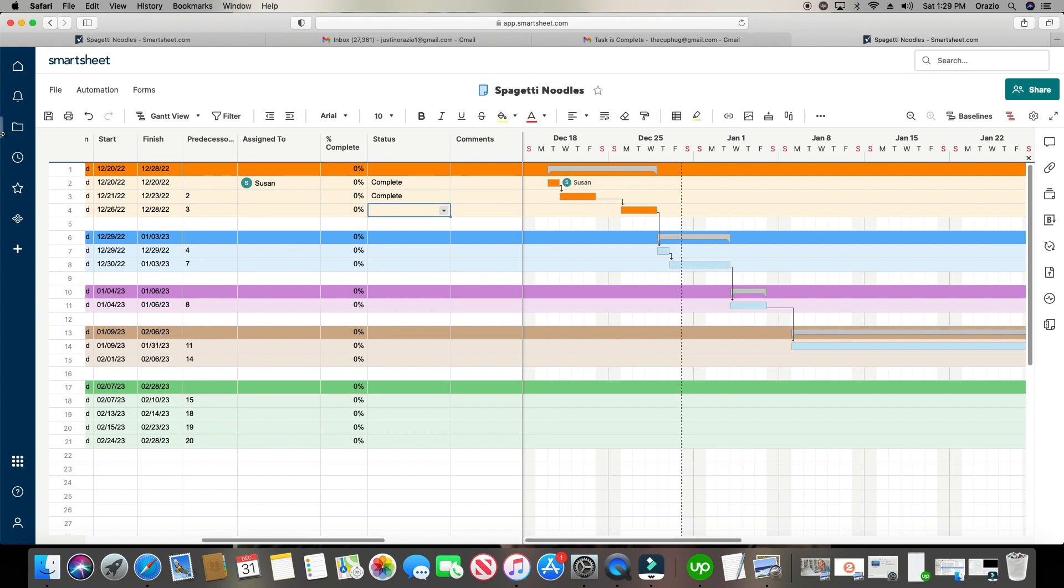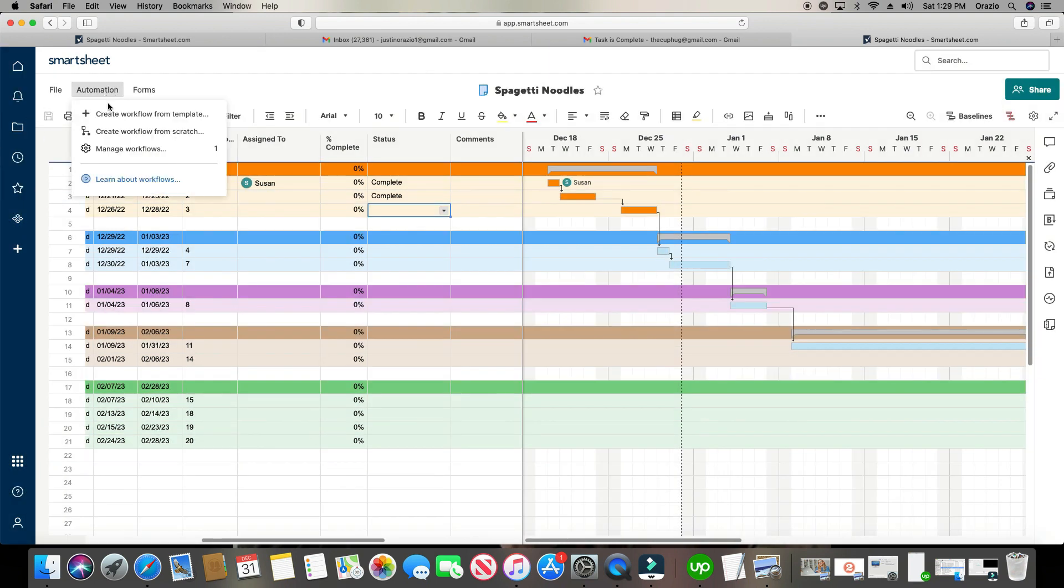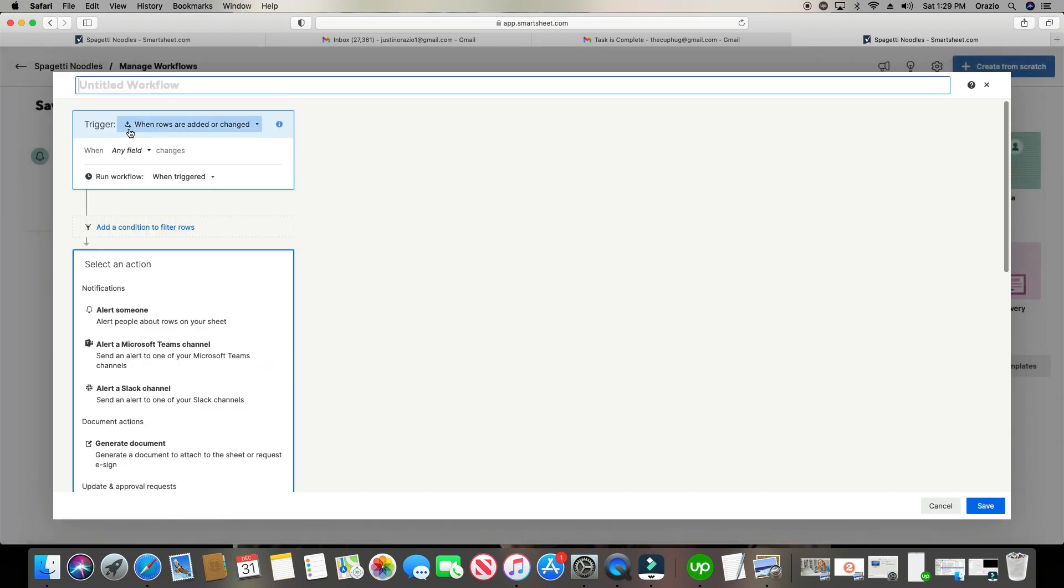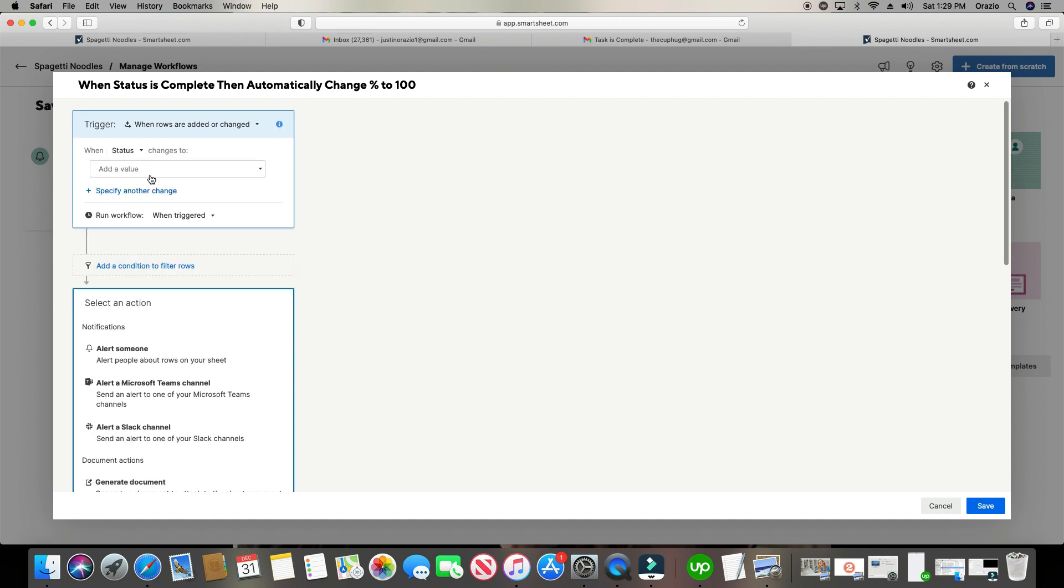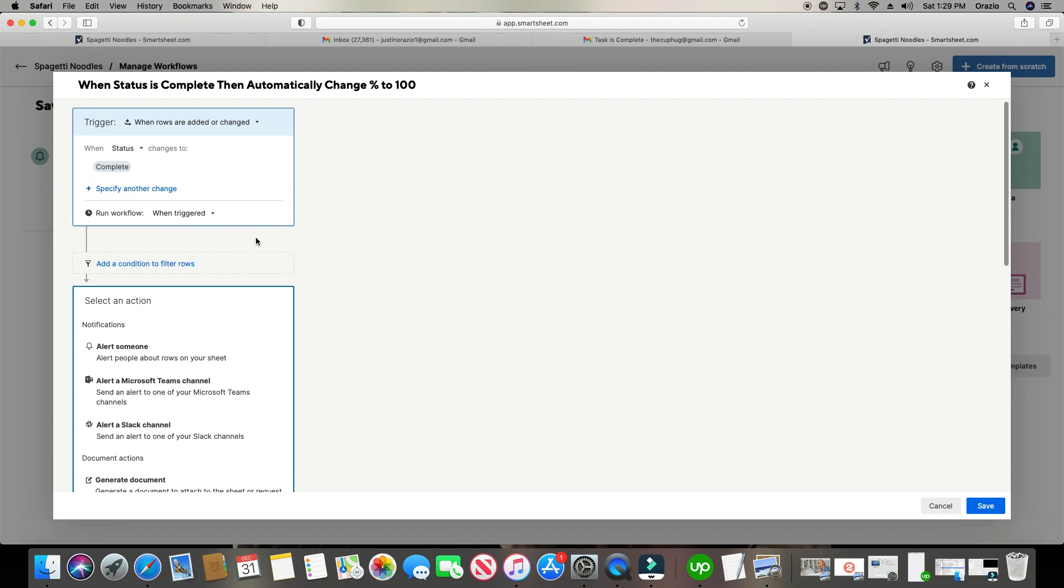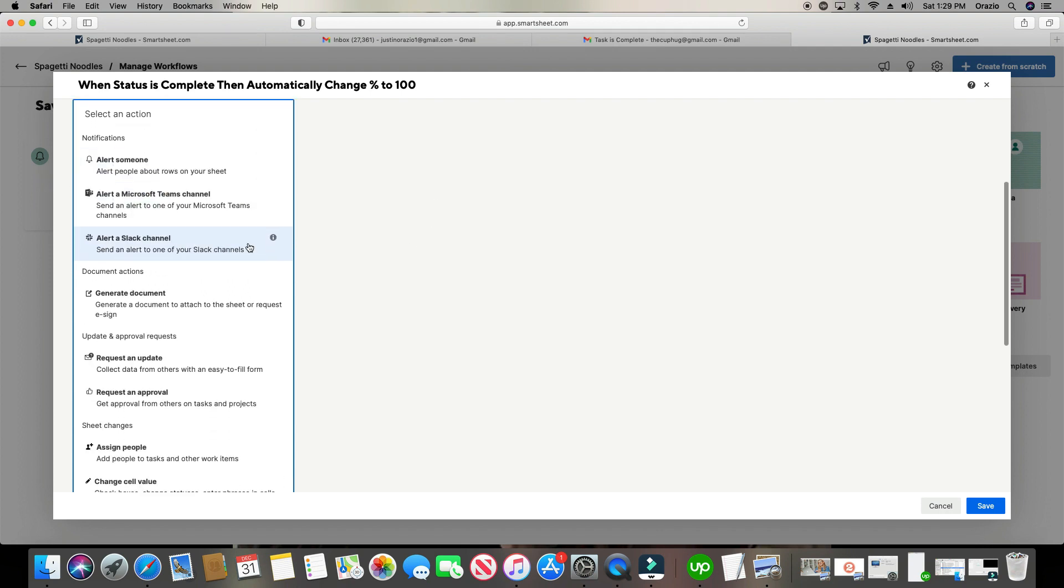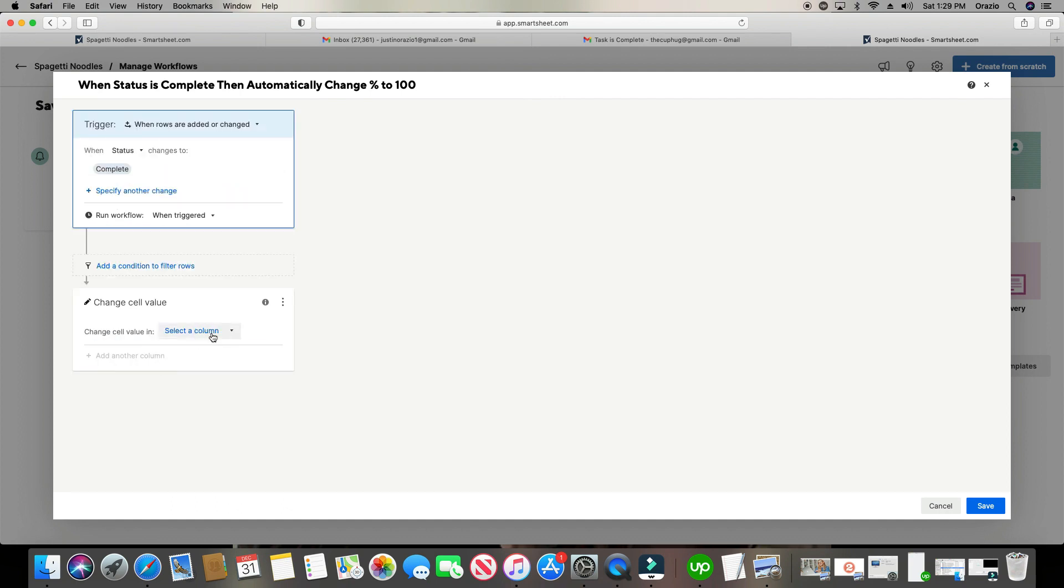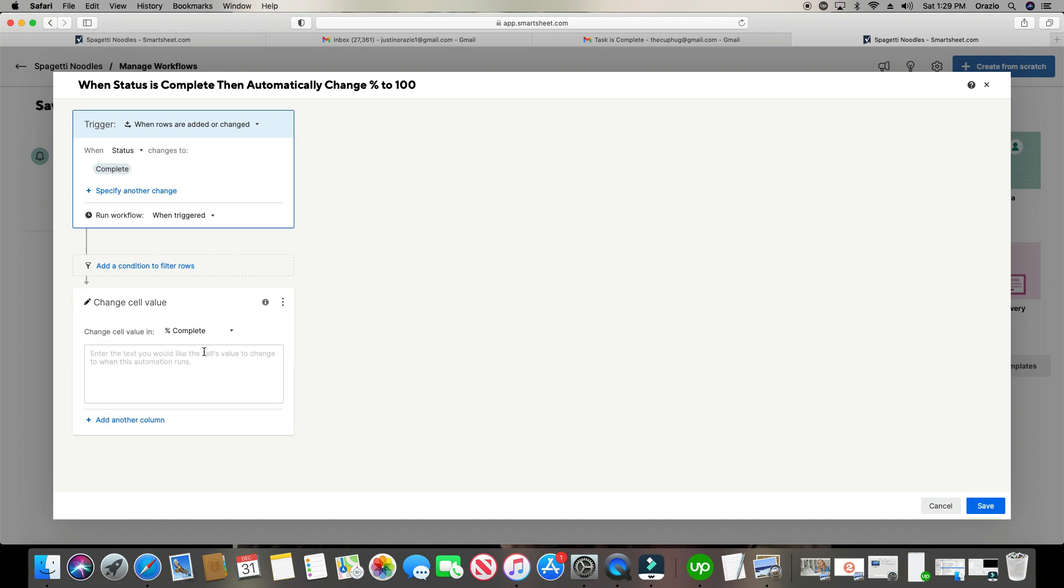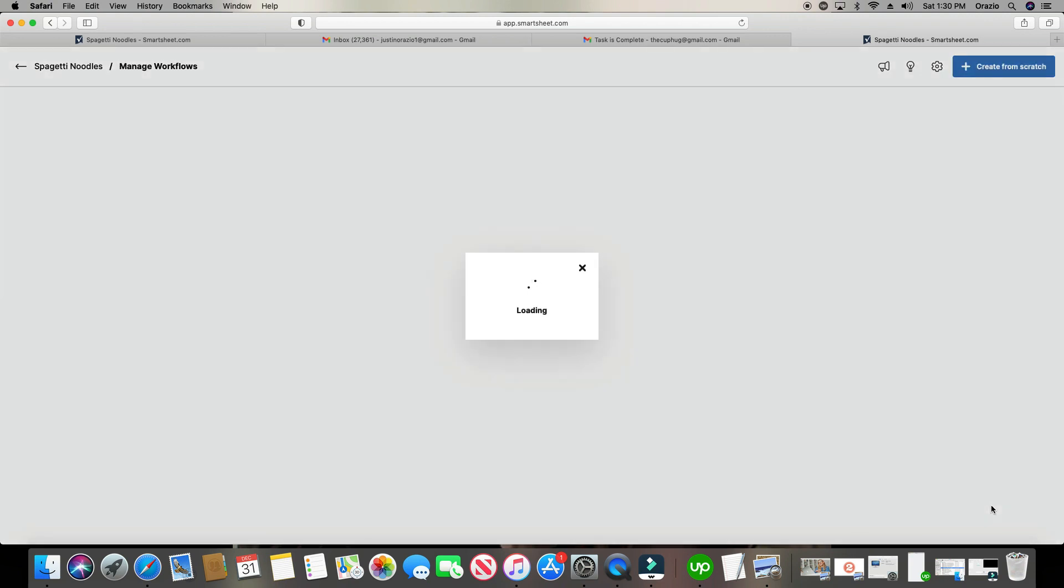So let's go ahead and do that. So leave this at zero. Save. Let's go back to our automation. Create one from scratch. Put in our title. The trigger. So same thing. When status changes to completed, that's the trigger. Then let's go down here. I want the change cell value. So I'm going to select the column. Go to percent complete. And in this box, I'm simply going to type in what I want the new cell to be, what I want that data to be. I'm simply going to put in 100 percent. And you can add more columns, too, that will be part of this trigger. But right now, to keep it simplified, I'm just going to do this one column right here. So it's going to change to whatever it was to now 100 percent when the status changes to complete. Let's go ahead and click save. And let's test it out.